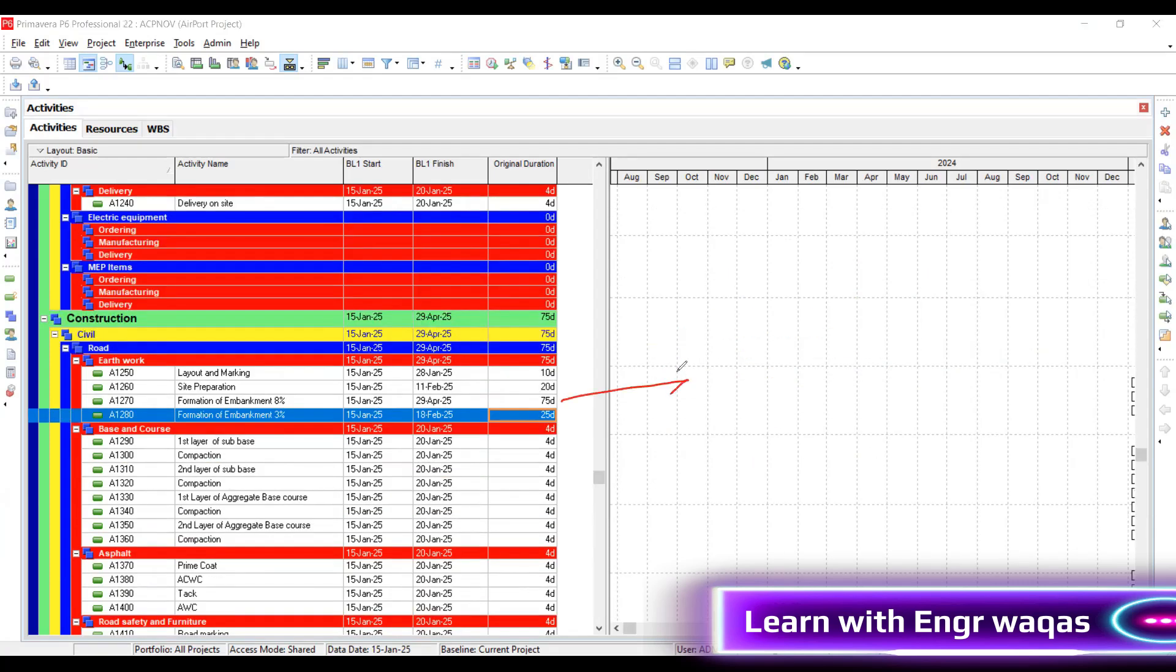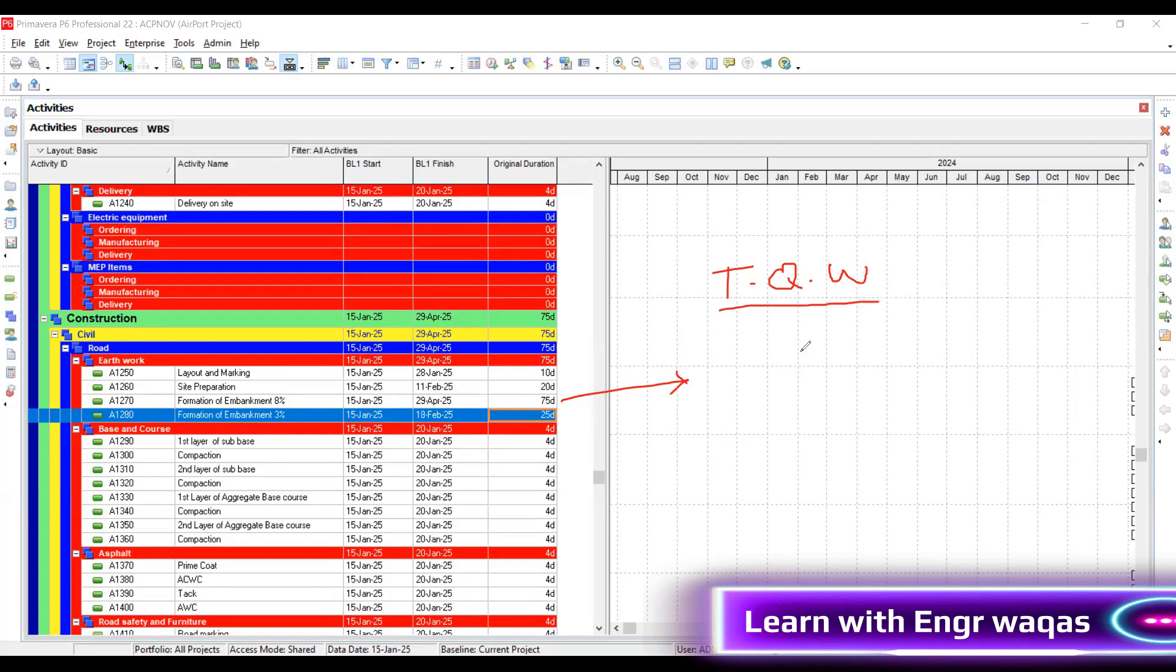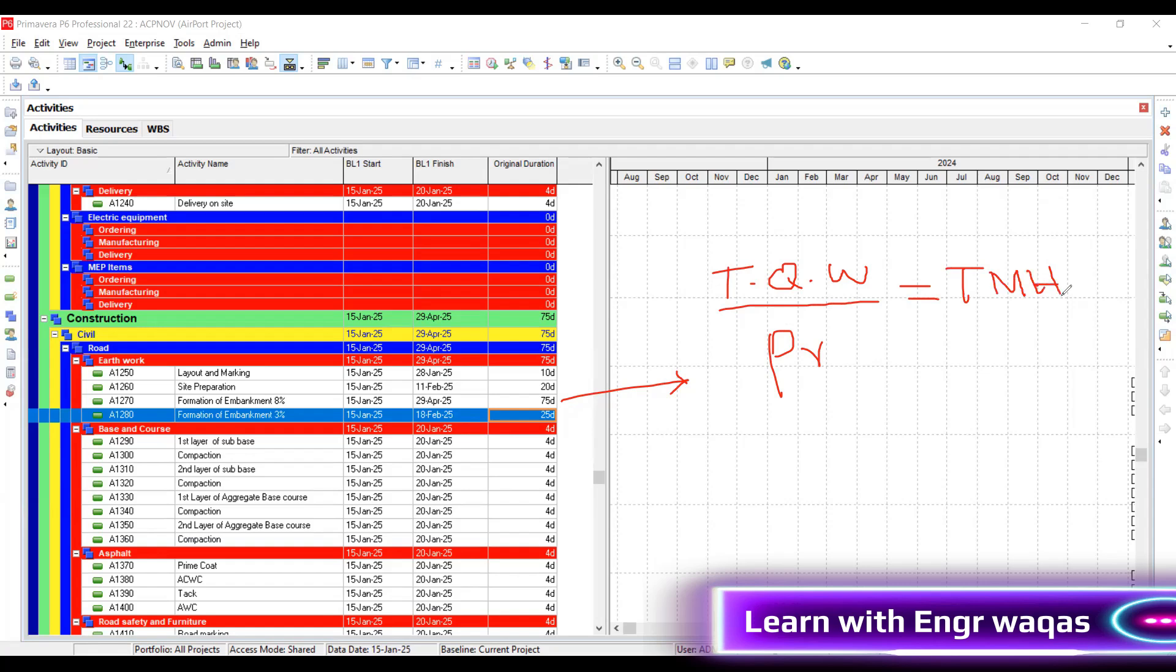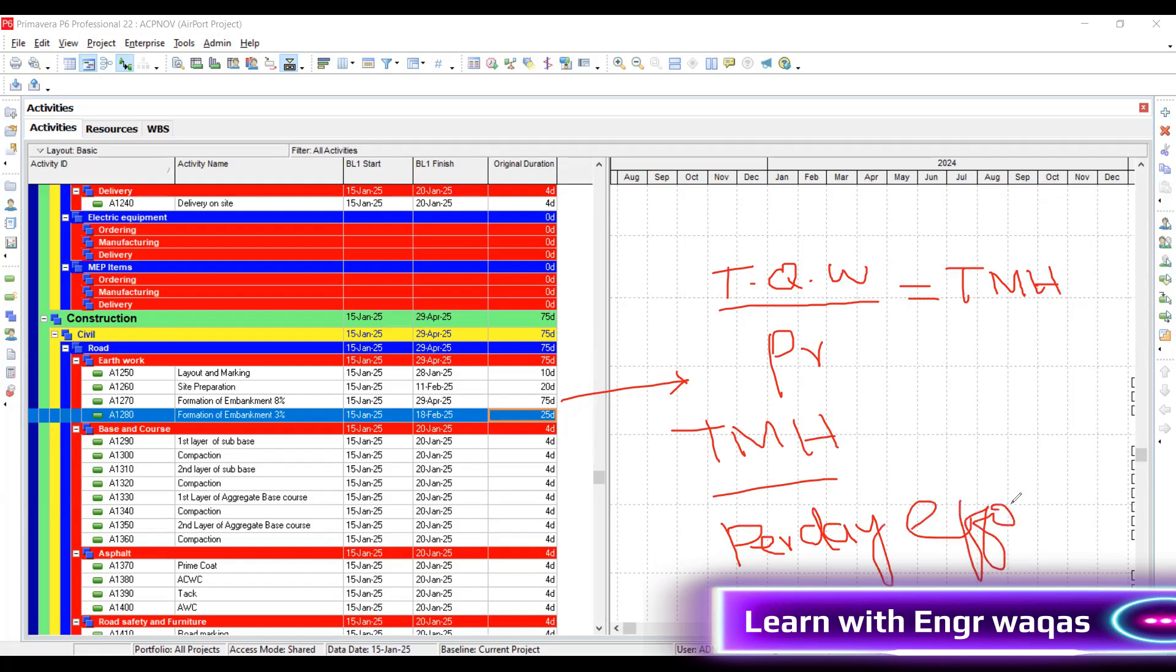What is the justification of 75 days? Total quantum of work divided by productivity is going to give you total man hours. Total man hours divided by per day effort is going to give you days. Do you understand? The justification - these two formulas are explaining everything.